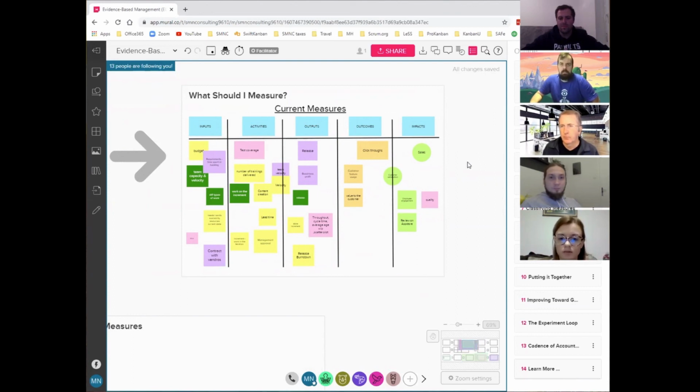Thank you. Yeah. And we have the same challenge in the Scrum world, by the way, because if you're using points to estimate and using velocity to talk about the items the team completed, it's very similar to the throughput measure in Kanban. I mean, there are differences, but at least to the first order, we could talk about velocity as sort of like a throughput. It's weighted throughput because we're measuring the relative amount of work and items, but it isn't a measure of value.